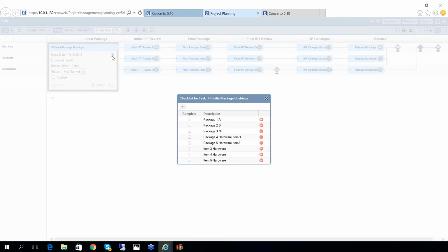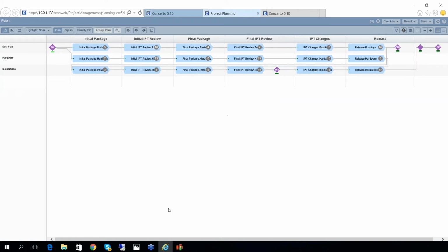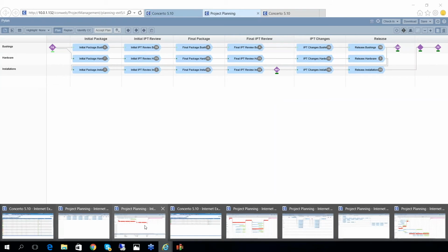And so in planning, your effort should be to get all these inputs on the front end of the project. In reality, some inputs will be late, so they might arrive when you actually execute the project. But from a planning perspective and a representation perspective, you need to just manage these inputs coming into one single point. Let me now also show you a timeline view of the same project.